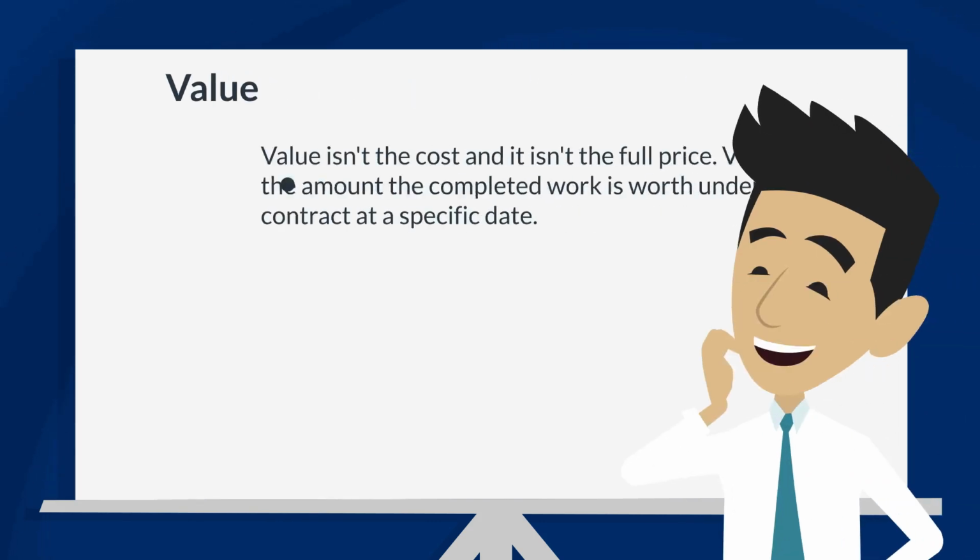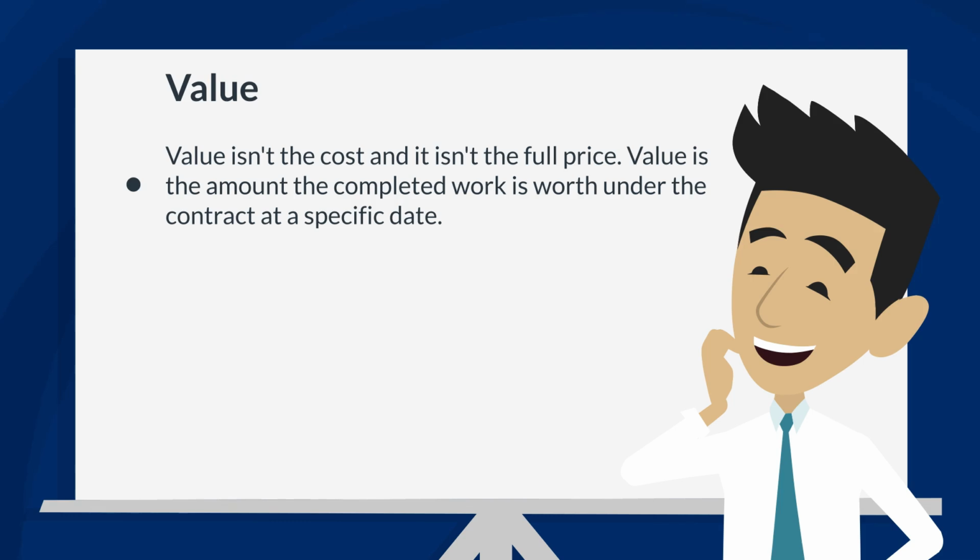Value. This is the one people sometimes get wrong. Value isn't the cost and it isn't the full price. Value is the amount that the completed work is worth under the contract at a specific date.